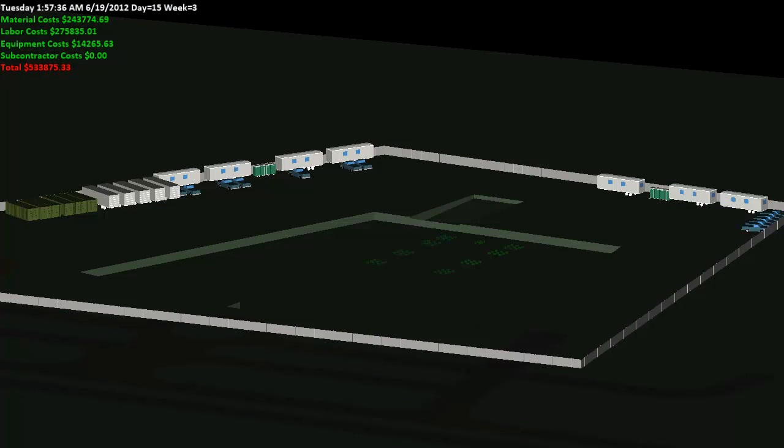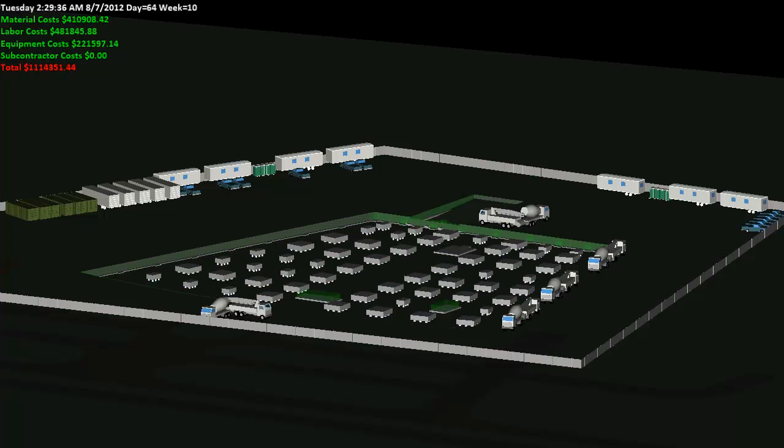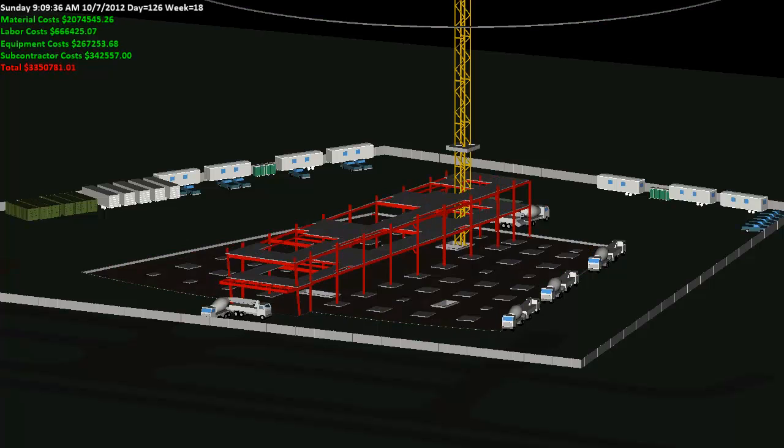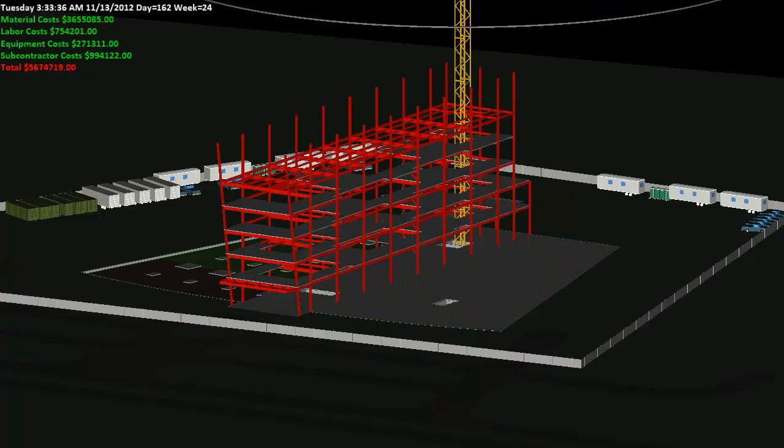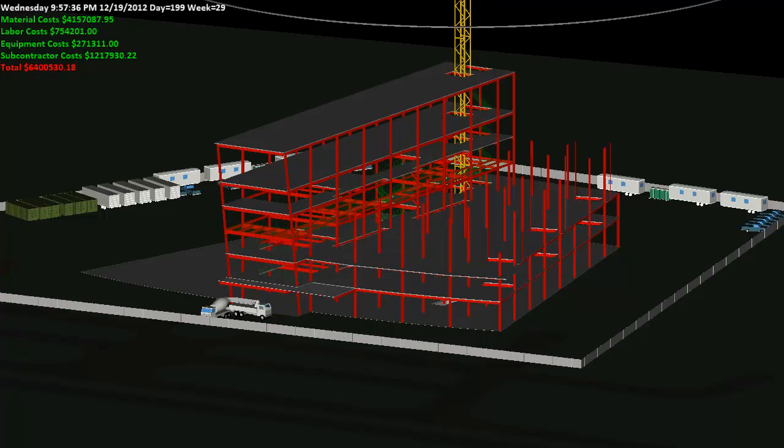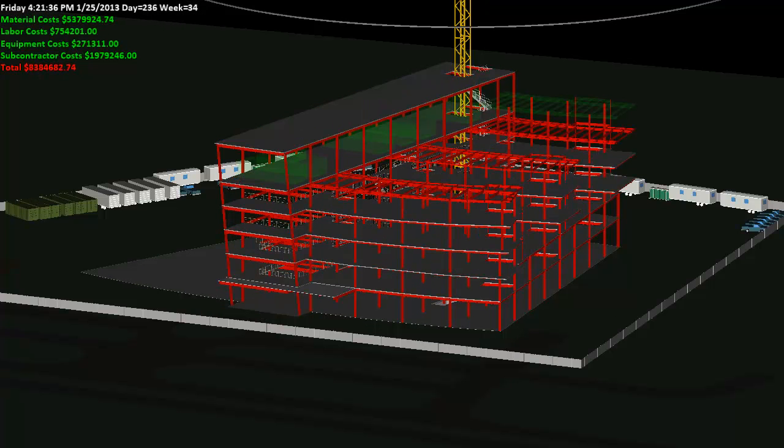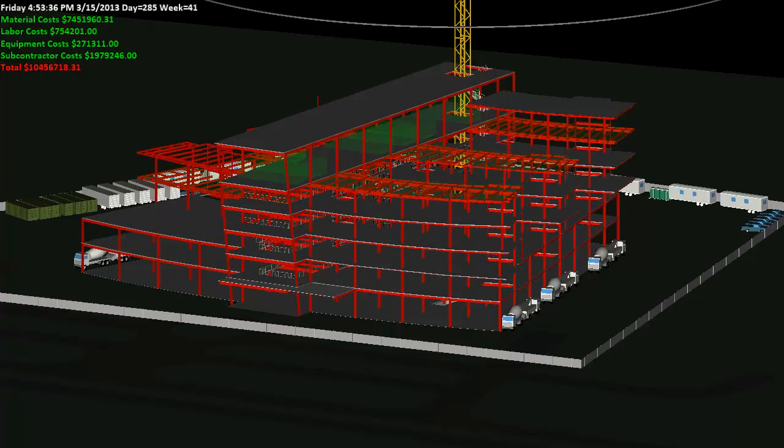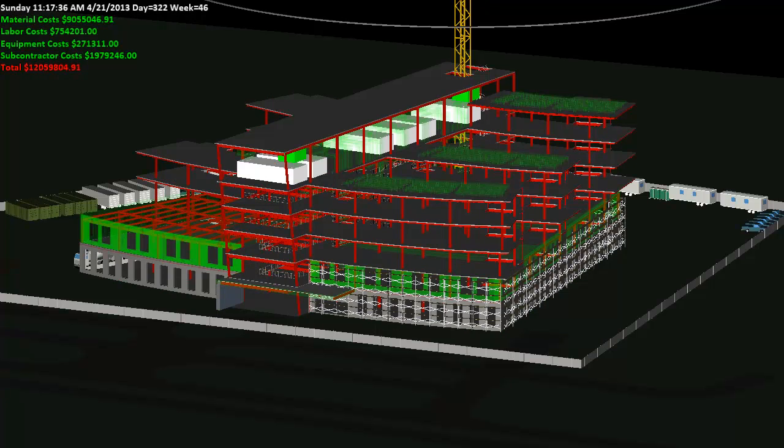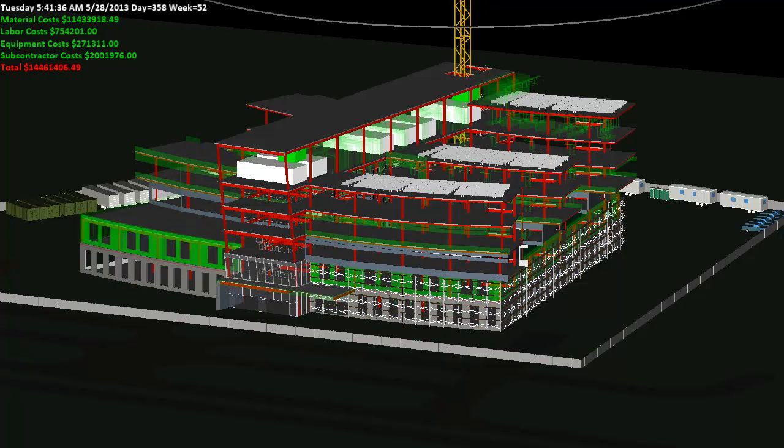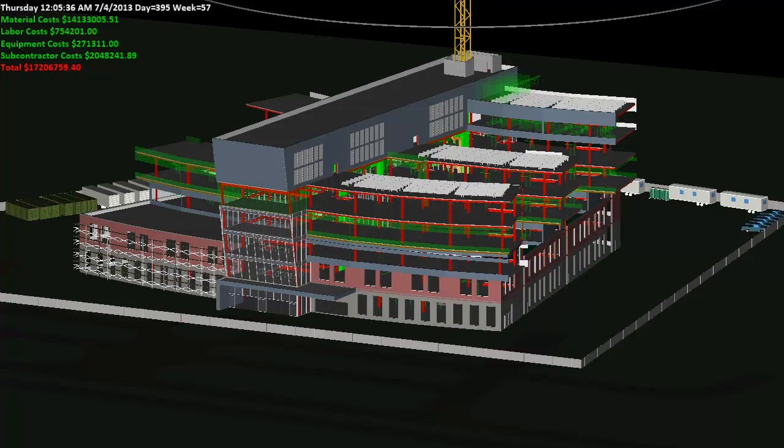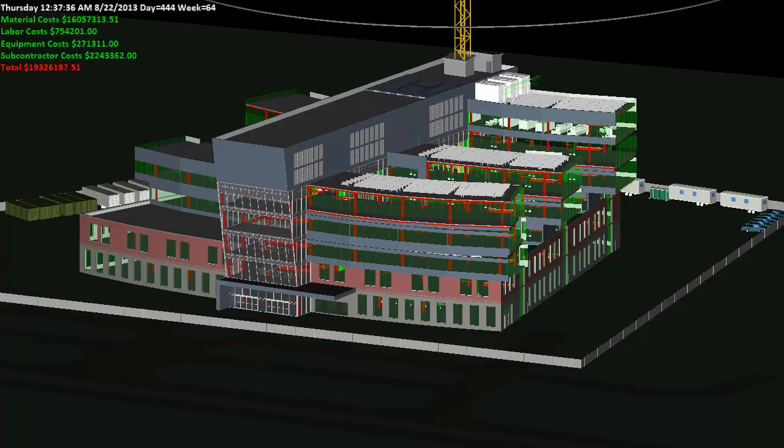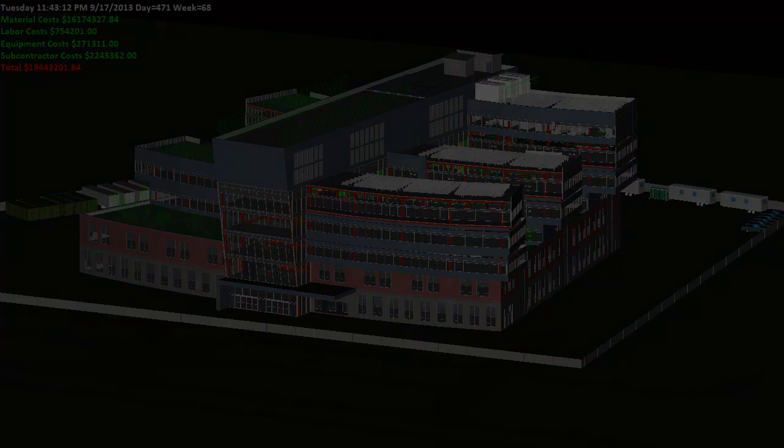The cost information can then be displayed within our 4D analysis, creating a fifth dimension of data to simulate, helping us better understand the impact certain tasks will have on our budget at any given time. The refined simulation and analysis can be reviewed to help identify any conflicts visually as the project is virtually built on the computer. All stakeholders can visualize the schedule and logistics in the 4th and 5th dimensions, time and cost respectively, and therefore can clearly understand the sequence, logistics, budget impacts, and relationships between all activities as well as identify potential problems.